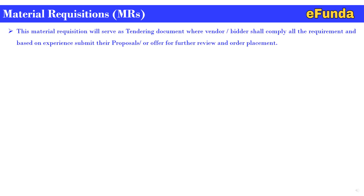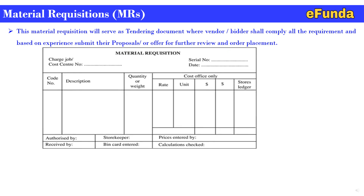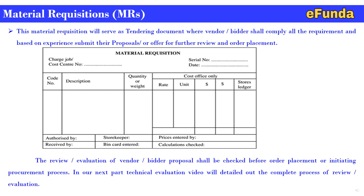This material requisition will serve as a tendering document where the vendor or reader shall comply with all the requirements and, based on experience, submit their proposals or technical offer for further review and order placement. A simplified material requisition form is shown for ready reference, illustrating how various client requirements are covered and how it serves as a tendering document to the vendor. The review and evaluation of a vendor offer or BDEL proposal shall be checked thoroughly before order placement or initiating the procurement process.